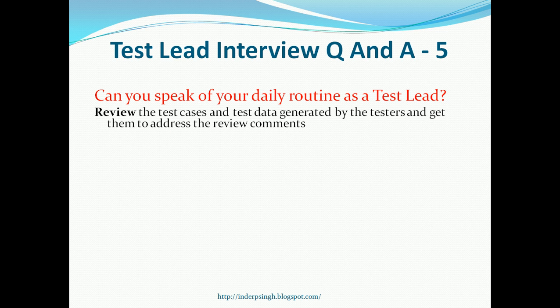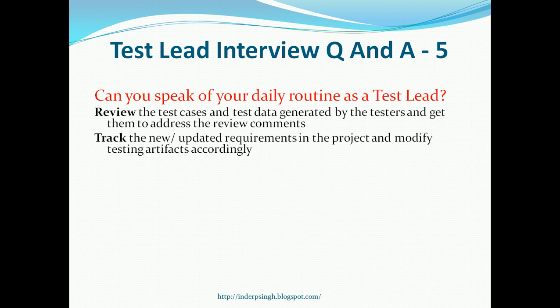So on a daily basis, the test lead reviews the test cases and test data that are built by the testers, and makes sure whatever review comments are there are addressed, to make the test cases and test data better to provide better testing. The test lead tracks the new requirements or any changes to the requirements, and makes sure that those changes get reflected in the test cases and test data, because they are going to be tested.